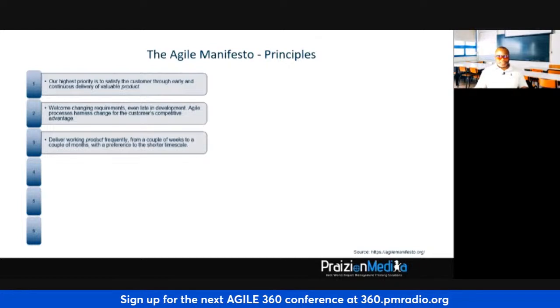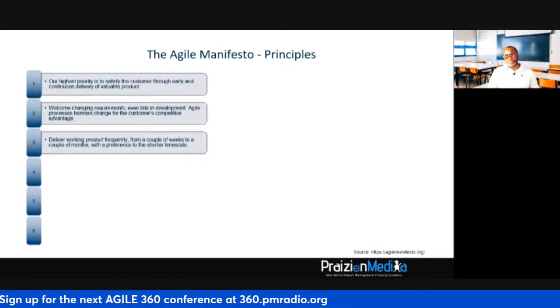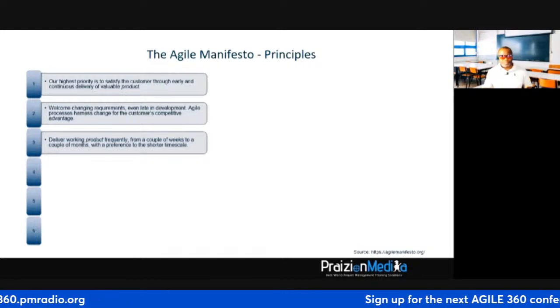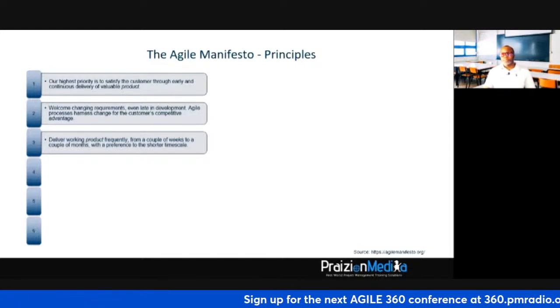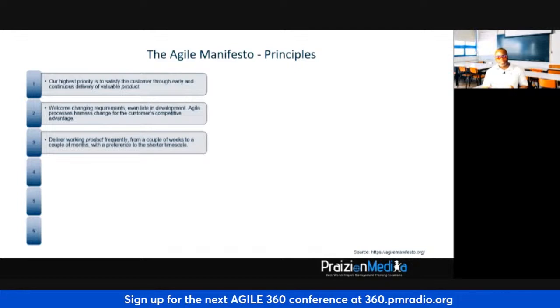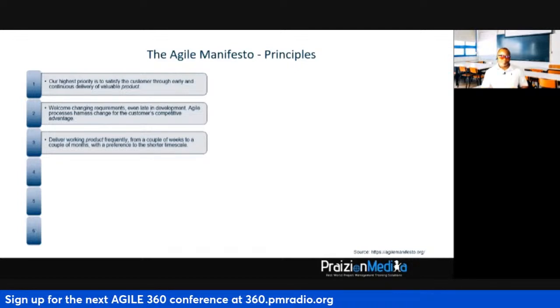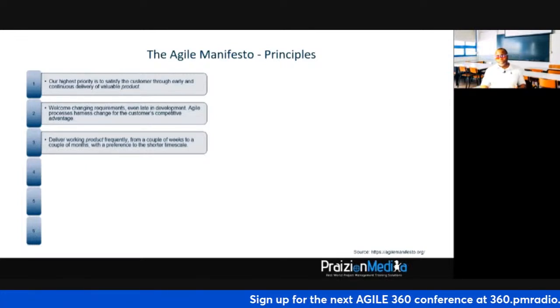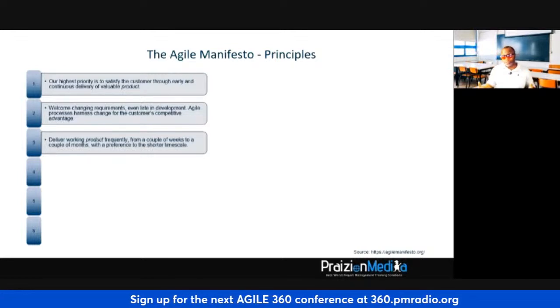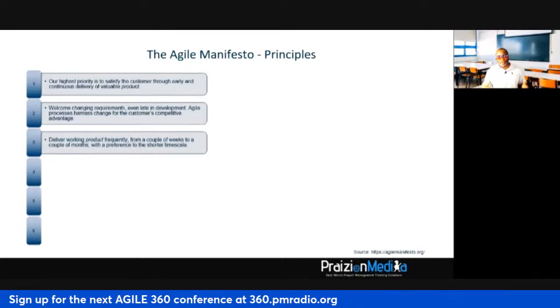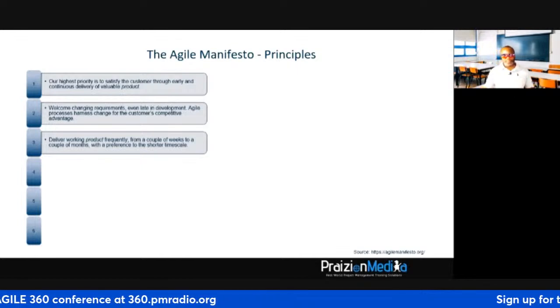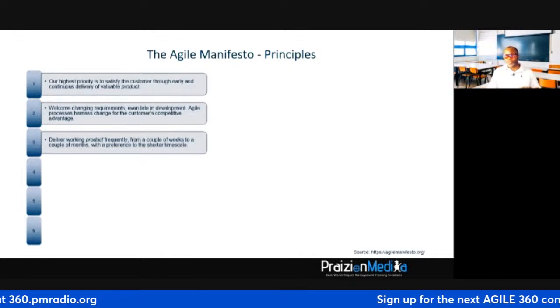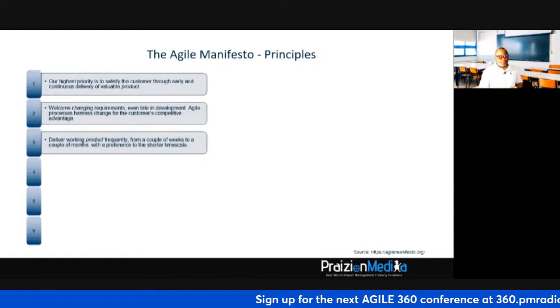When you're working in an agile environment, you've got to make sure that you deliver frequently so that you can catch any errors as early as possible. Delivering frequently is actually a risk coping mechanism. Delivering in tiny little batches, there's a likelihood that you'll be able to catch anything that's off, versus in predictive, where you deliver at the end and there's a big bang, and what happens? You realize this isn't what we wanted. So in Agile, we have a lot of risk coping mechanisms, and frequent delivery is one of them.